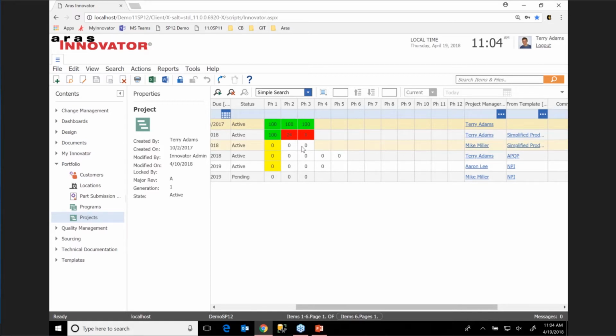And I want to briefly cover what these colors mean in the status. So status is visually displayed using green, yellow, and red colors. It's very visible to see what activities need attention and see the overall health of the project timeline. So green here indicates that the finish date of the activity, or all the activities in the phases, is more than 6 days away.